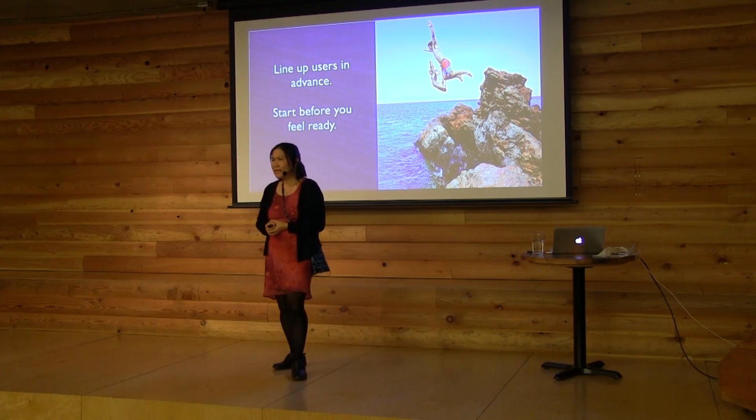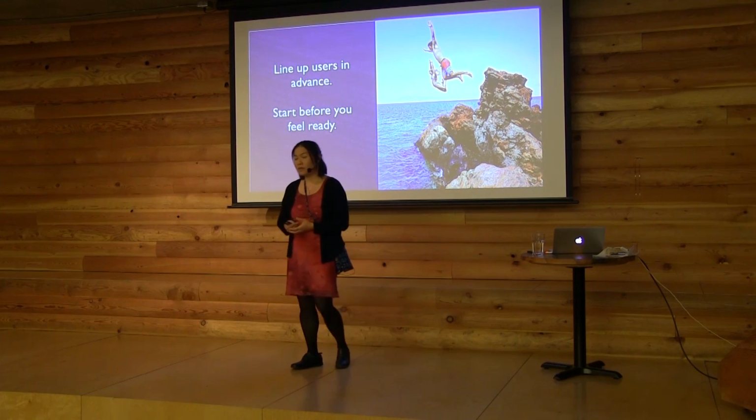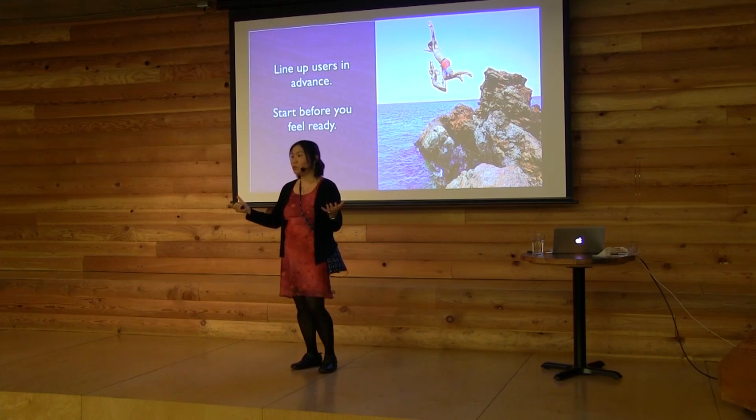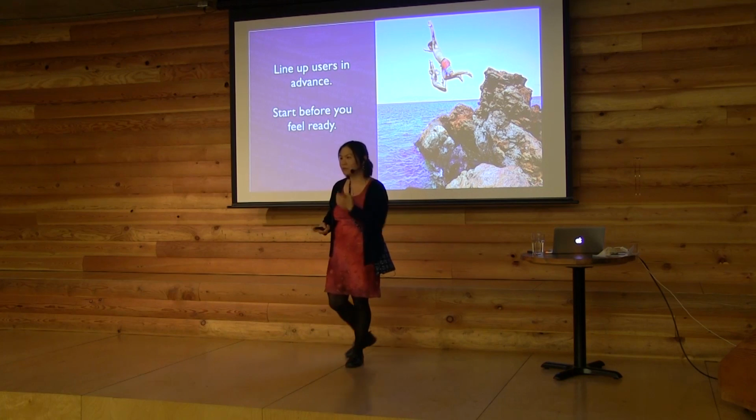There are some companies where the designer's given a user story to design something, and the acceptance criteria actually will say, this design work isn't done until it's been tested, and until the users have gotten it to work.